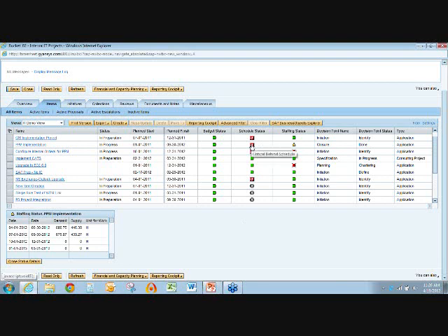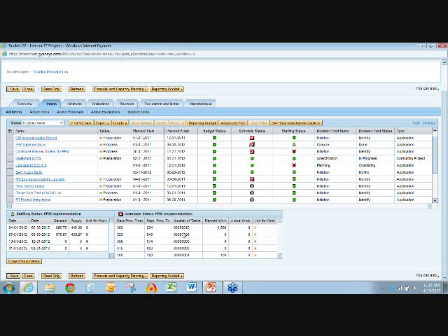And I can look and say, well, why do I have this critical alert? Why am I critically behind schedule? Well, standard 25, 50, 75, 100%. I can say I've got 15 tasks at the aggregate level. I have 4,600 hours, and I haven't started yet. So that would definitely put me behind schedule.